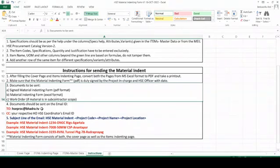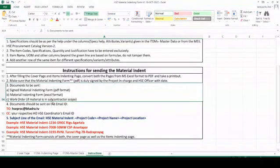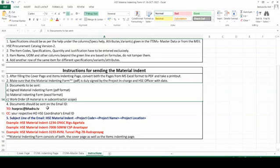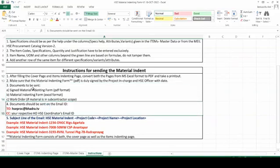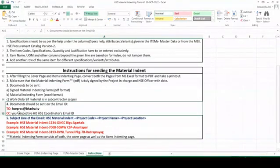Next is the material indenting form in Excel format — the whole Excel which we have filled, both cover page and items indenting page, this whole Excel sheet is required. The name of the Excel sheet is: HSE Material Indenting Format Version 1, 18th October. In this, the work order has to be attached if material is in subcontractor scope. If it is in MEL scope we don't need the work order; if it is in subcontractor scope, we have to get the work order copy from your end.